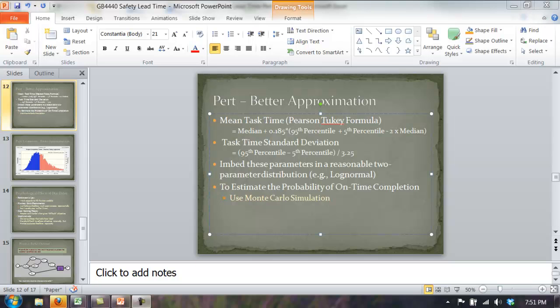In this video, we're going to look at using the Pearson-Tuckey formula to estimate the parameters of a task time distribution. This is covered at the end of the chapter on schedule risk. This formula has been shown to be more accurate than the classic PERT approximation. The formula treats the three numbers we've been given differently, and that's the most important difference between this formula and the classic PERT formula.